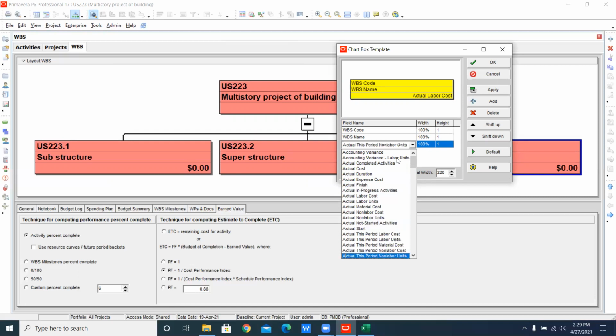But the resource cost is the basic thing, because whenever you are working in the industry, they will not ask you for the project cost. They will ask you how much cost is going to be spent on your activities. Give me the record of that. This one is the major and important thing that you have to handle. You have to handle your schedule, because schedule is one of the basic techniques to handle it. Because in the schedule, when 2, 3 or 4 days get extended, then your money will also be extended. You have to give more money for that, because your labor is working 2, 3 or 4 days more.